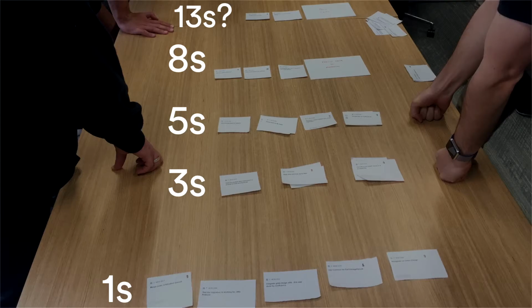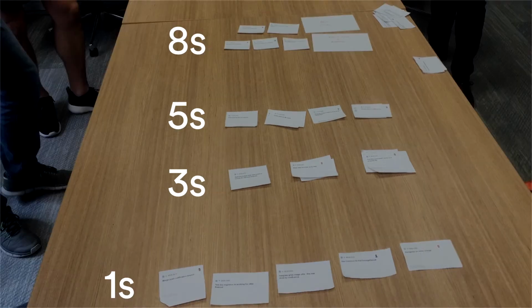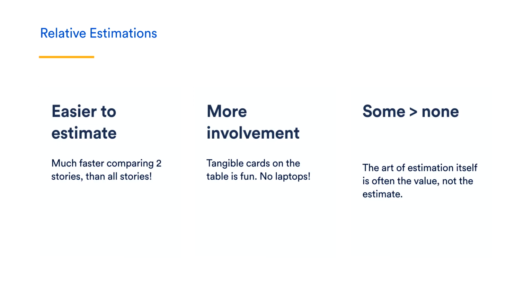In this session, though, they kind of think about the previous sprints and they say, well, those 13s, they're not really 13s compared to other sprints. So they calibrate across sprints by checking. And so they just merge them in, and then they've got their 8s, and off they go. Update the story points and make a sprint commitment in JIRA. And they find this is a lot easier. They enjoy that it's kind of standing around a table using physical cards.